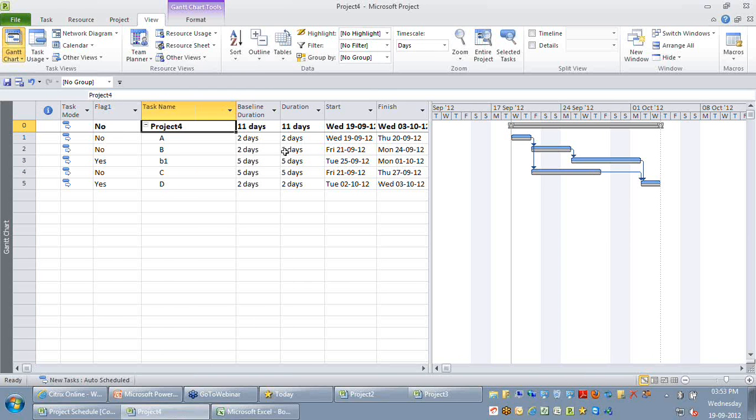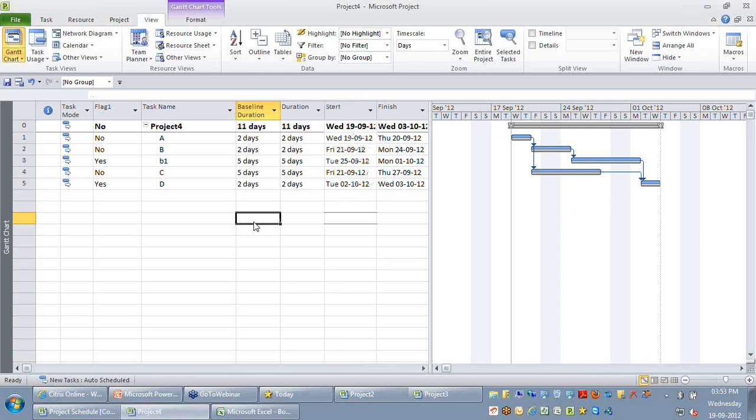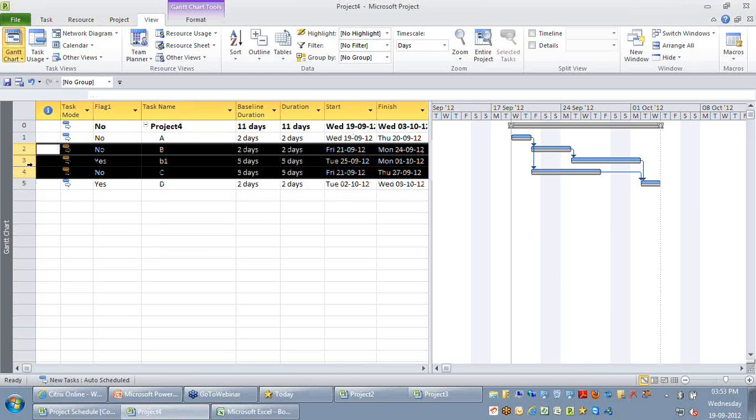There was another question: how do we plan the revamp, baseline, or re-estimate for a major change when a project is at 30%? I just explained that you only need to select those impacted activities in your project and re-baseline only those selected activities.